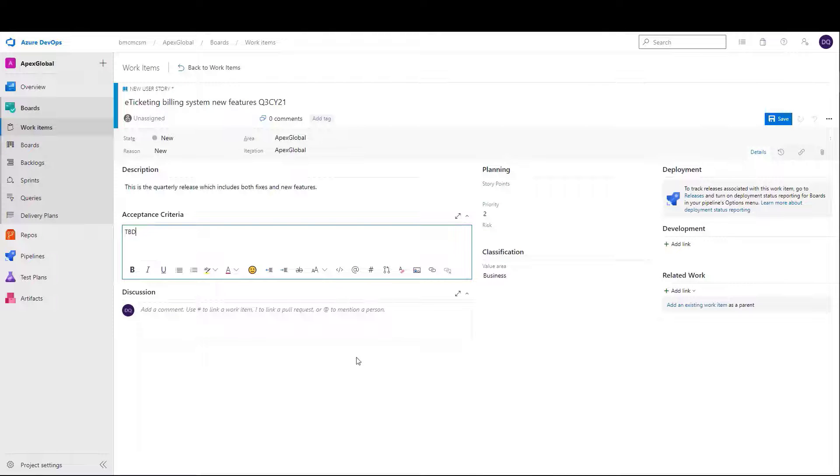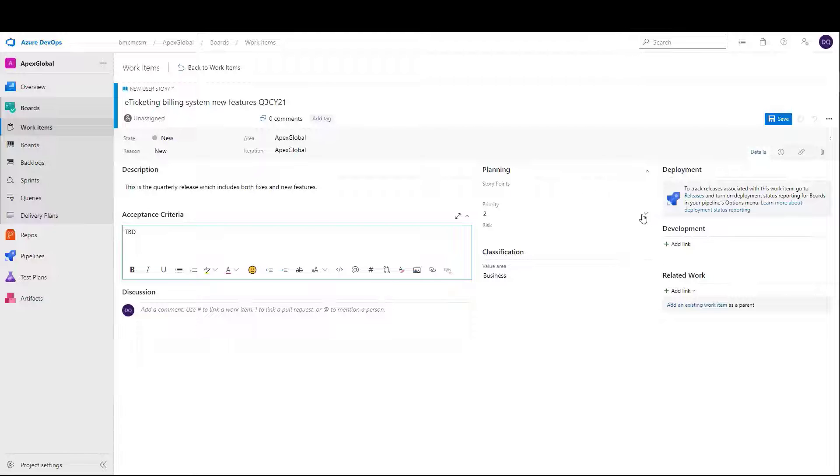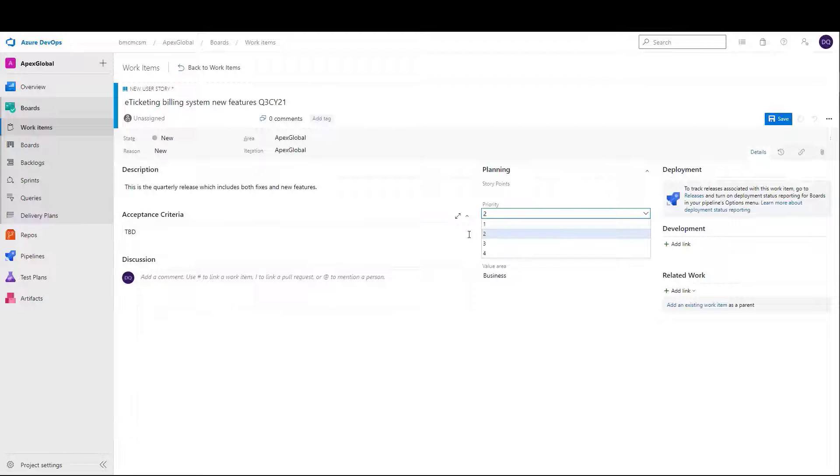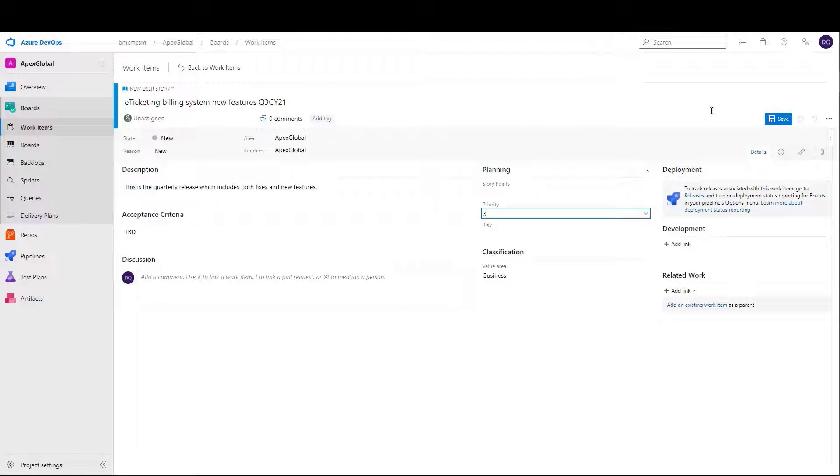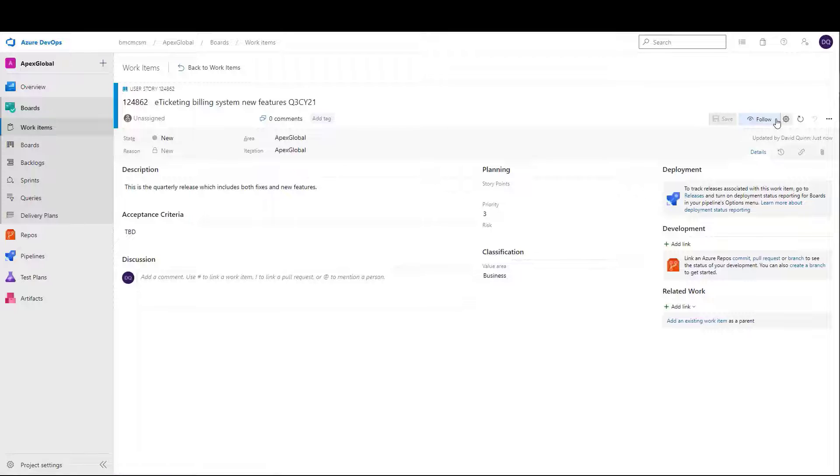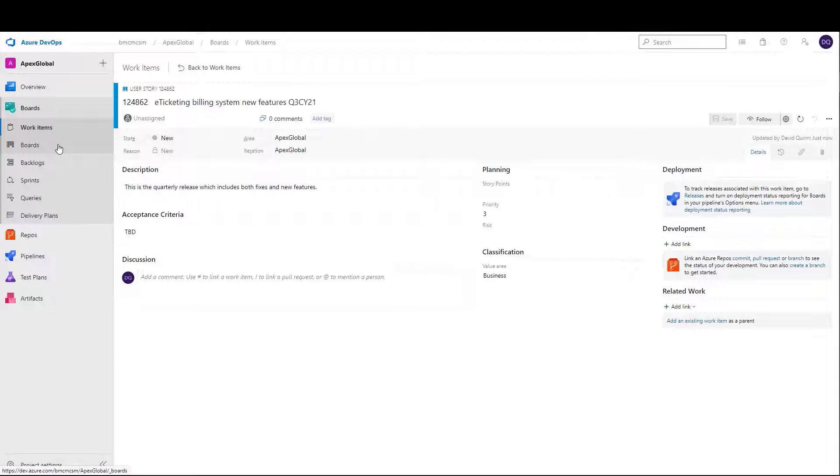Here, the DevOps team member is using Microsoft Azure DevOps. As we see, the developer simply completes the task of creating the user story as they always have done, but the change request will be created automatically in the change system so the change process can be followed.